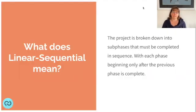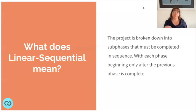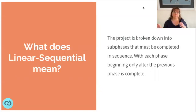So what does linear sequential mean? It means the project is broken down into distinct sub-phases that need to be completed in sequence. Before the next phase can start, the previous phase has to be completed. Linear sequential also indicates that you can't loop back regularly — once you've completed a stage and moved on to the next, you continue along that linear sequence. You don't have the ability to go back and revisit; if you do, you need to start again.